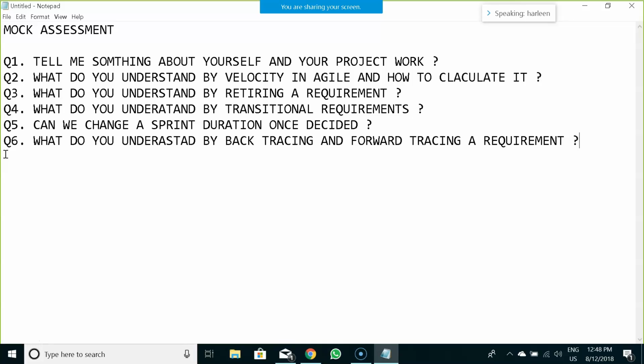So essentially, whenever we are asked to trace back a requirement to its source, like how the requirement originated, the approach is always back tracing the requirement. We go back to the requirement repository and check what is the base version of that requirement, and after the baselining of the requirement, how many subsequent versions have been created for that requirement. So that process is back tracing.